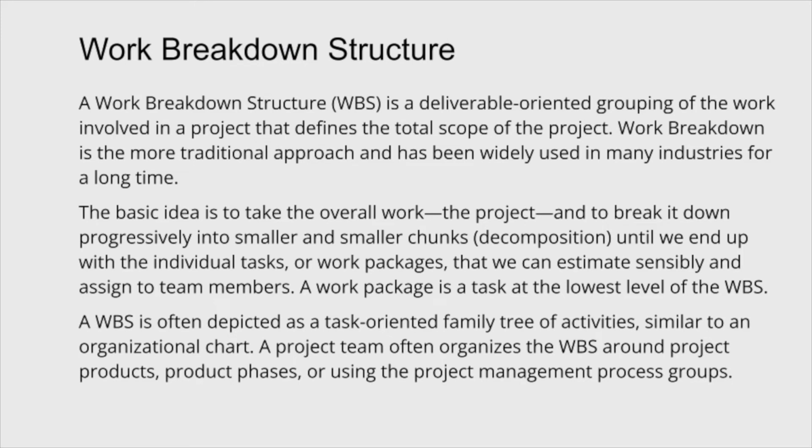As the name suggests, a work breakdown structure breaks the project down into its subcomponents. The basic idea is to take the overall work, the entire project, and break it down progressively into smaller and smaller chunks, called decomposition, until we end up with individual tasks or work packages that we can estimate sensibly and assign to various team members. So a work package is really a task at the lowest level of the work breakdown structure. So this is what we need to do today type thing.